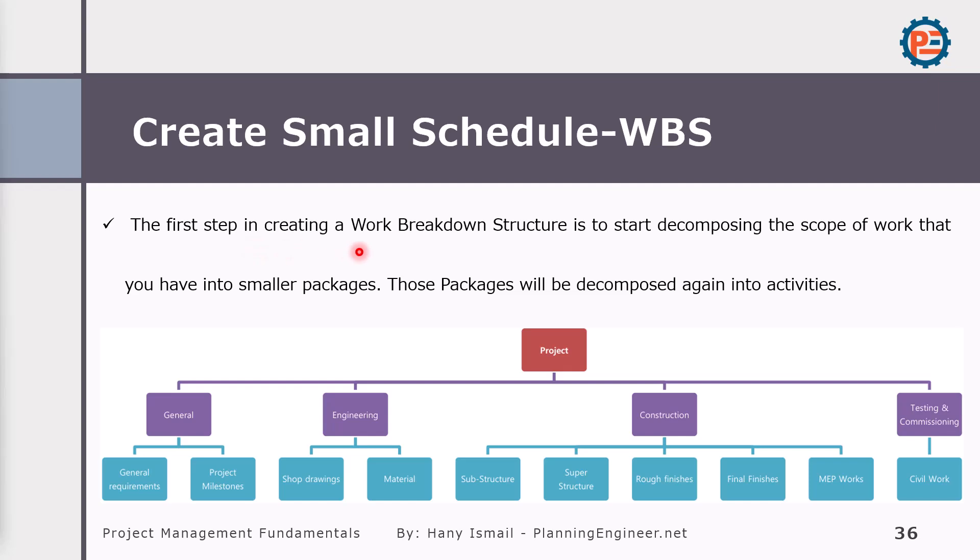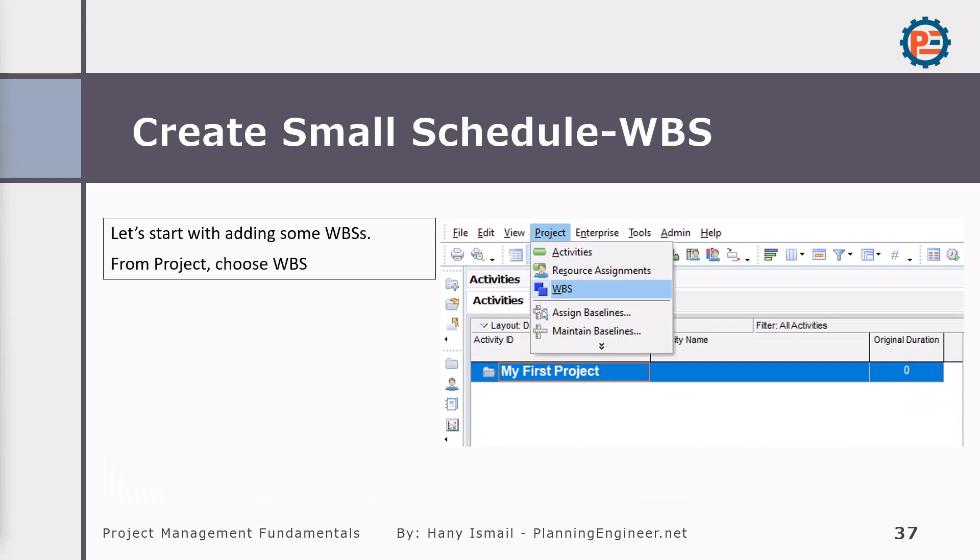The first step in creating work breakdown structure is to start decomposing the scope of work that you have into smaller packages. These packages will be decomposed again into activities. And here, from the best practices in planning, you should discuss with the project team, the owner of the project, the consultant, the contractor, subcontractors, whoever is important how we are going to construct the project. You might decide to have different, as I said before, different zones, different areas. So it is better to know it at the beginning.